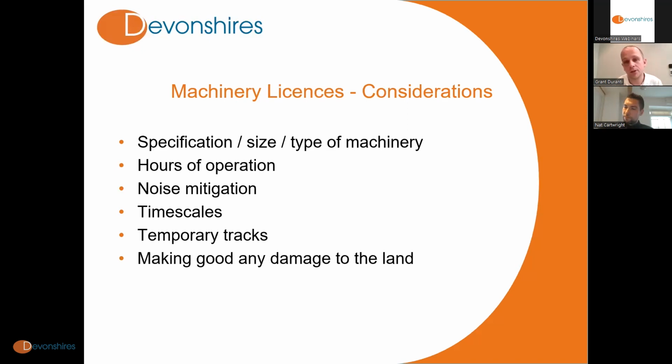If you're bringing machinery over grass, for example, you may need to lay some kind of temporary tracks, to temporary hard surface, so as not to damage the land. And similarly, you're likely to have an obligation to make good any damage to the land that you make.